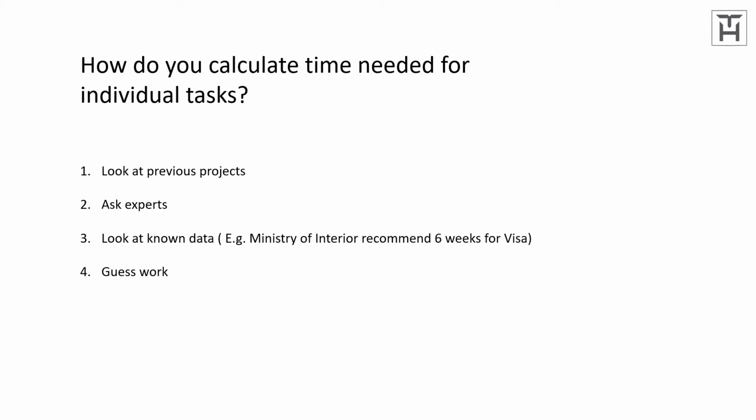For those that I don't know, I will ask colleagues and experts who have a better understanding. For example, buying the equipment we need for the training, I'll talk to my colleagues in imaging or photographic experts and find out how long they think it would take to get this equipment.